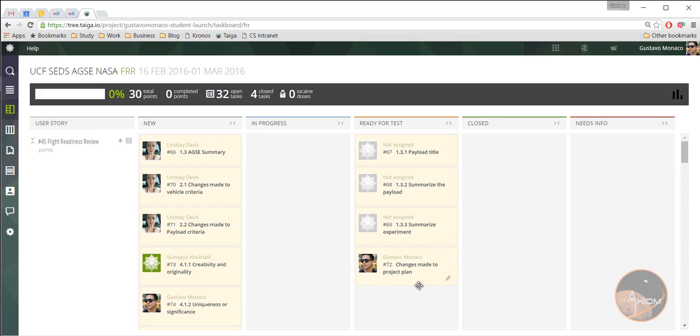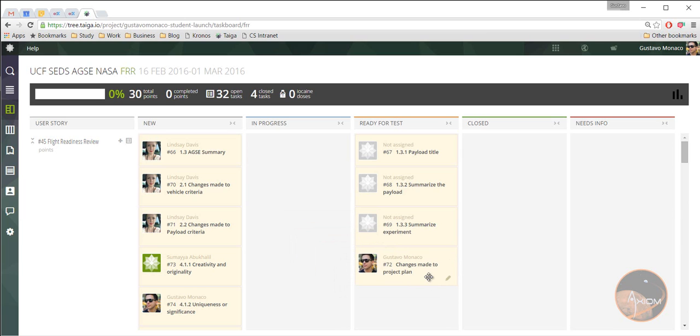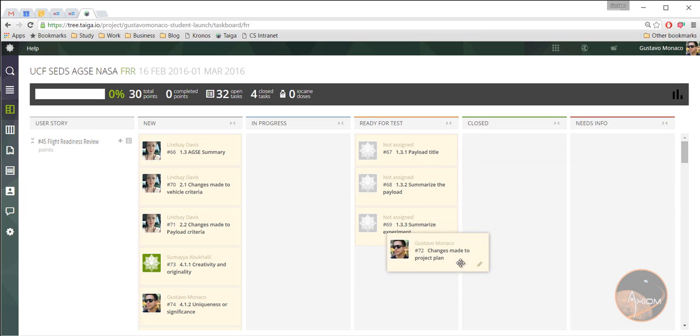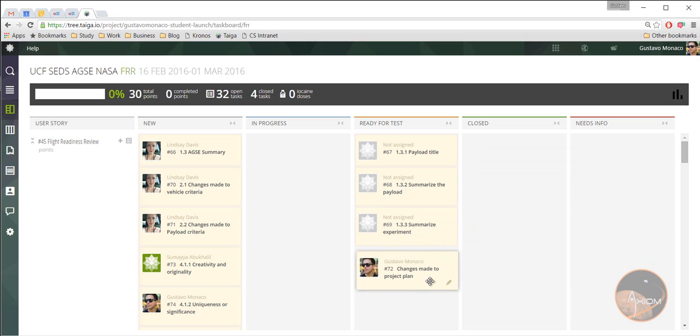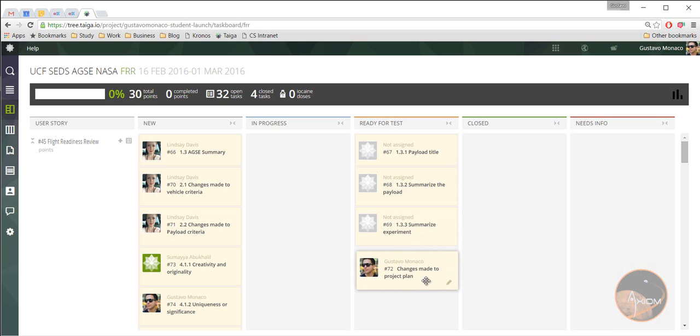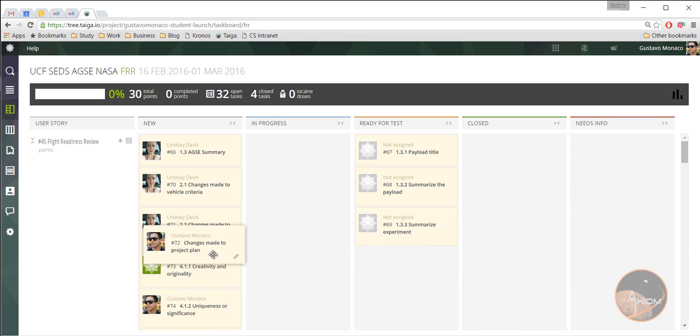Once it's ready for test, then Linz or Diego will actually review it. And then once they review it, and they're happy with what you wrote, then they will put it in close. Or if you guys didn't do as good of a job, they will put it back to new.